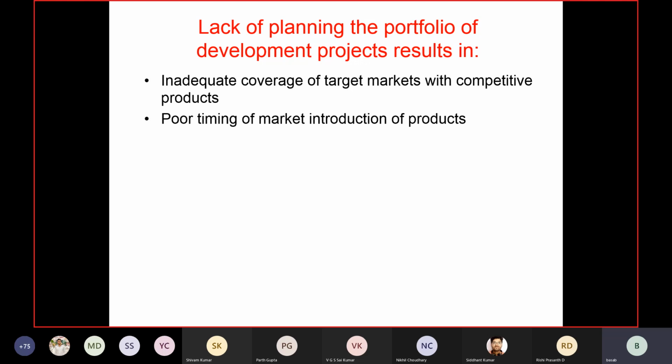You see, Nano's time of introduction. I mean, there are many reasons for Nano's failure, our car, Nano, Tata make. But one of the major reasons was definitely the timing of market introduction, which got shifted by at least more than a year, and it got a beating in the market. By that time, Maruti had already come with a low-priced Maruti, where they replaced the initial engine with the aluminum-based engine, that's the K10 engine. Then they came back to the market again with a low-priced edition of Maruti 800, and so on and so forth, just to fight.